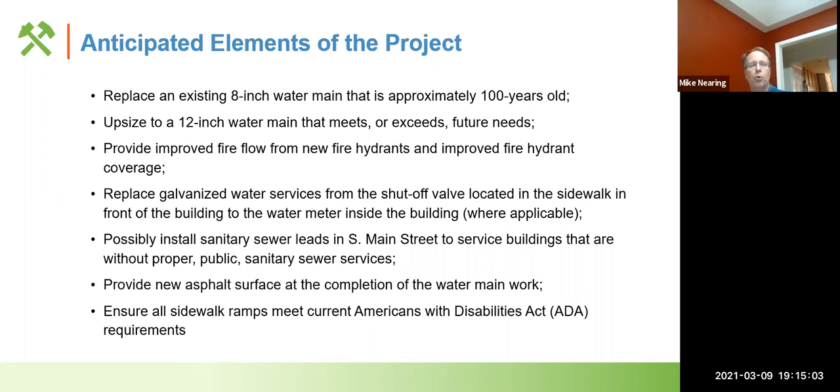As part of this work, we will provide improved fire flow from the new fire hydrants and improved fire hydrant coverage. We will also replace any galvanized water services that exist from the shutoff valve located in the sidewalk in front of the building to the water meter inside the building, where those galvanized services may still exist. We're doing that to comply with new state of Michigan criteria for the removal of lead and lead piping.